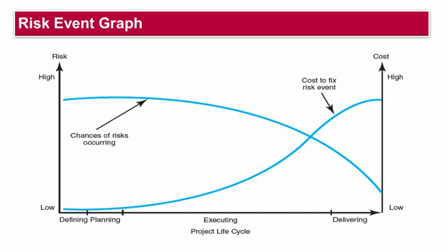As the project progresses, uncertainties are addressed and critical questions are answered. This leads to a decrease in the likelihood of risk events occurring. Mitigation strategies like risk identification and planning become more effective. However, the cost impact of a risk event paradoxically increases with progress. This is because the project has become more invested in resources and time. For instance, discovering a major design flaw after a prototype has been built carries a much higher cost burden compared to identifying it during the planning phase.